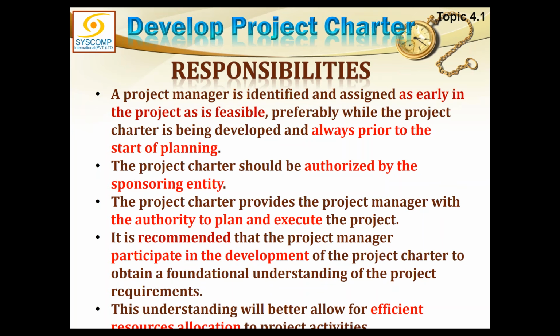The project charter should be authorized by the sponsoring entity, the sponsor himself. The project charter provides the project manager with the authority to plan and execute the project. It is recommended that the project manager participate in the development of the project charter to obtain a foundational understanding of the project requirements. I think this is self-explanatory, and this understanding will better allow for efficient resource allocation to project activities.